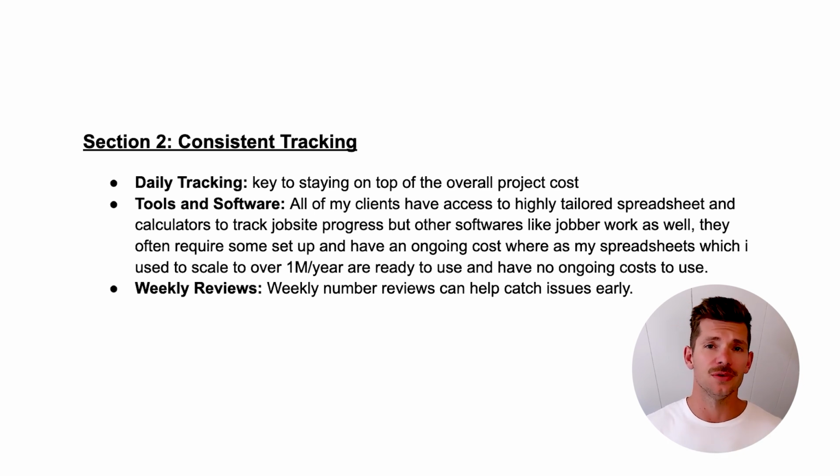The other way that you stay consistent on your tracking is with weekly reviews, all right? You're going to review the money that's being spent. Your project lead should be tracking every day. They're gonna let you know if there's a big overage, but weekly you're gonna review. Where are we at? Are we where we're supposed to be? Did we go way over on labor? What is it that we need to know about now so that we can let the homeowner know, okay?